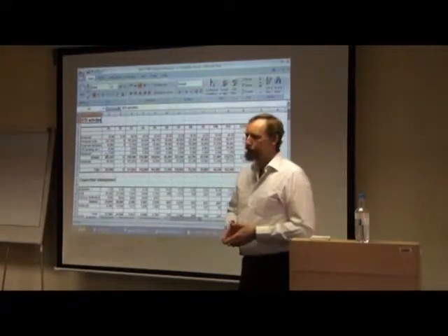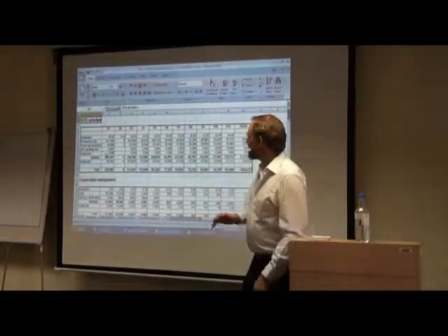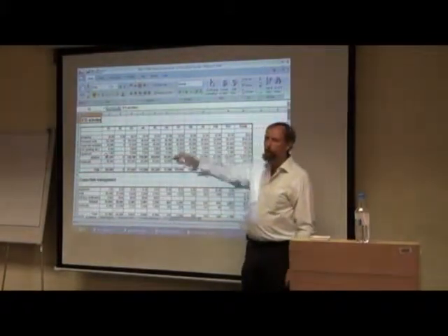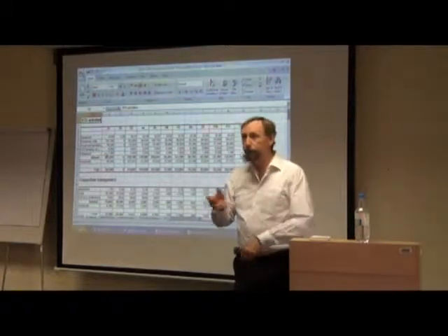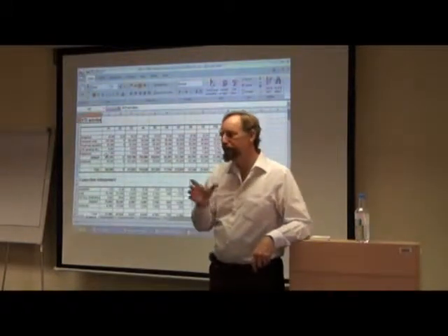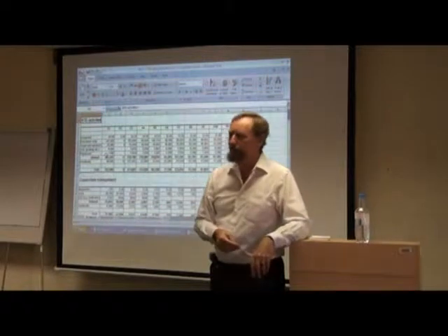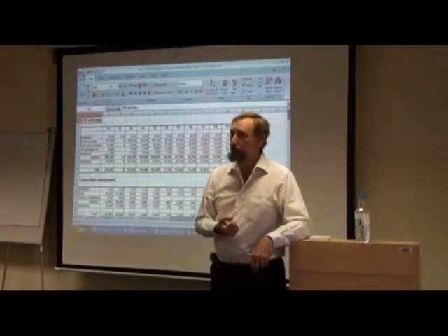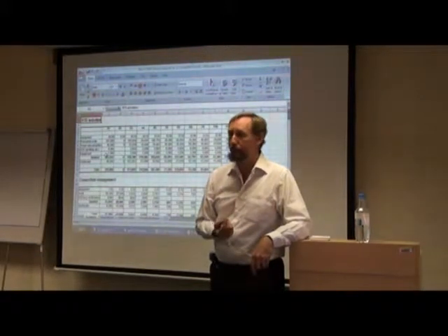I can tell you that for FP7 now the rule is that if you need to make shifts between categories, that is allowed. You don't even have to ask permission for small shifts, like 5, maybe 10%. That is usually accepted without problem. If you make major shifts, you really have to ask permission up front, but it is allowed.